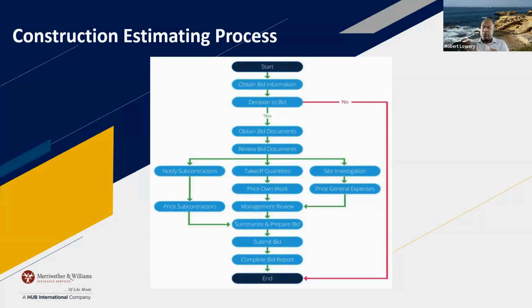So you're going to take that duration of 100 days and determine the percentage that each person is going to be working. Your superintendent or foreman is 100%. You as a project manager might be 25% of the time. So you can calculate your overhead from that cost. That is the importance of it.